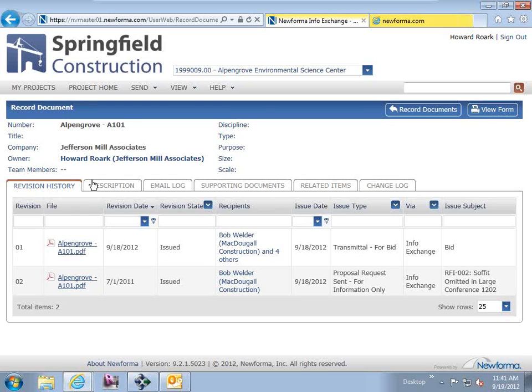Other questions there? Yes. Actually, if you're doing a project with multiple work packages for construction management, you can use the document sets for the individual work packages. Mm-hmm. And then you use what you're calling record documents for what the industry calls the conformed set, that is the cumulative set. There you go. That's another good example. Again, kind of work and then that final.